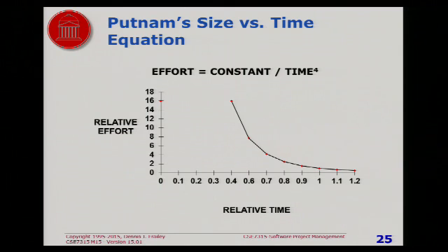The formula is not magic. The formula is not based on the laws of physics. The formula is based on doing a curve fit to some data. Many times in the field of estimating in particular, you run into formulas that are based on this sort of technique. They got a lot of data, did a lot of curve fitting to the data, and said, well, this curve seems to fit the data, therefore let's use this curve. But it may not work. So don't ever make the assumption that the model has to be right. The model may not be. The formula may not be right for your situation.